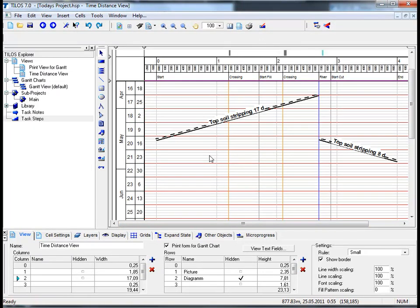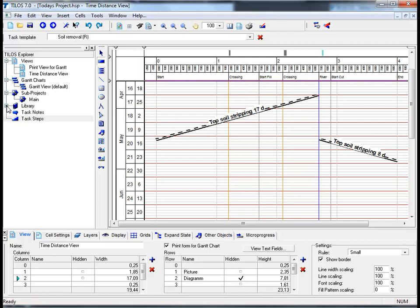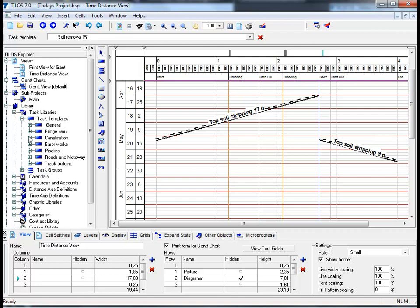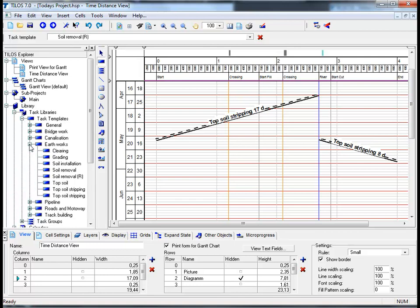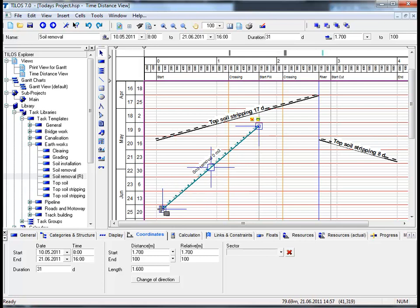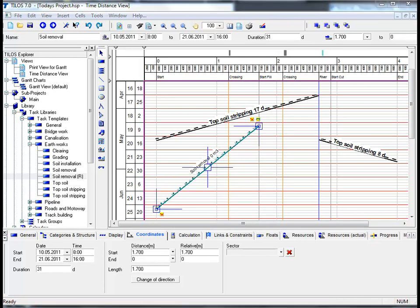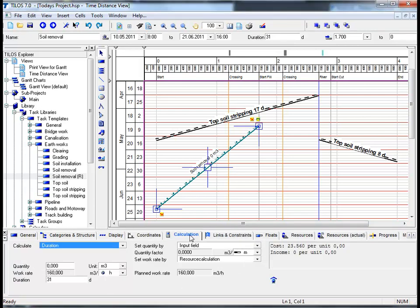I'm now going to show you how to add a task using the TILUS Explorer. Proceed to the Insert Task icon in the Insert Object Toolbar, then go into the TILUS Explorer, click on Library, Task Libraries, Task Templates, and choose Earthworks. The Top Soil Stripping Task has been completed, and you would now like to remove the soil beneath it. By clicking on the Soil Removal task, draw the task from 1700 to 0. Then click on the Calculation view tab in the Details Toolbar and insert the desired quantity - in this case 45,400 cubic meters - and hit return.